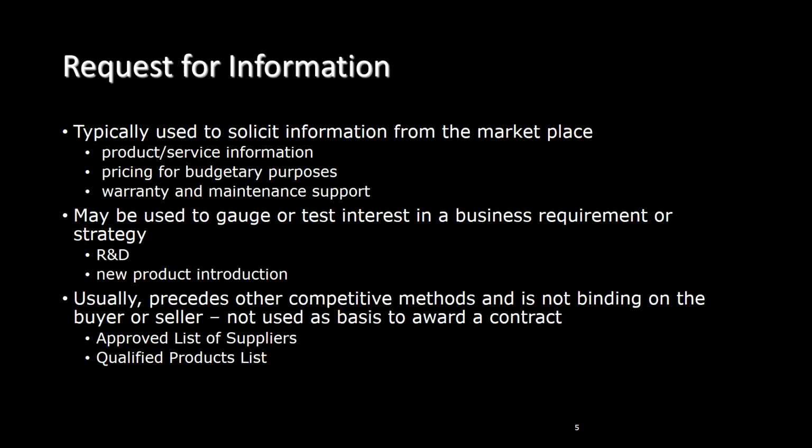Usually, the issuance of RFIs precede other competitive methods. It is important to note that RFI responses are not binding on the buyer or seller. Therefore, RFIs are not used as basis to award a contract. However, RFIs may result in an approved list of suppliers who are then invited to participate in an RFP solicitation. An RFI may also result in a qualified products list, which may then be the basis for bids to be requested.